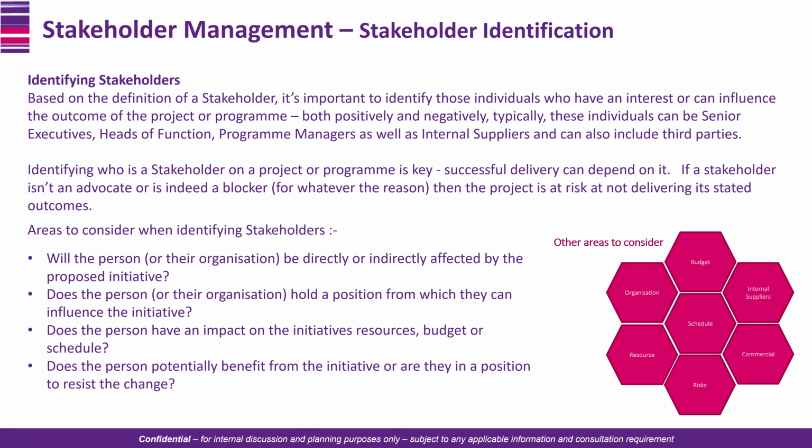So, what is the first thing you need to do? Identify your stakeholders. That's the first process. I mean, the first thing you need to do, like we said, is develop a strategy, your stakeholders engagement or management strategy. After you've done that, try and identify your stakeholders. After you've identified the stakeholders, you now need to analyze the stakeholders. After analyzing the stakeholders, you now need to put a response plan in place, which is a communications plan on how you intend to manage them and all that.